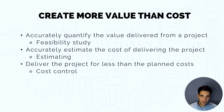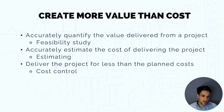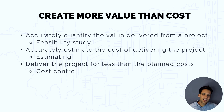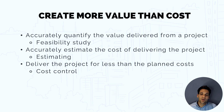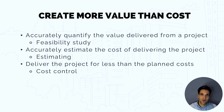To ensure we fulfill the objectives of project cost management, we need to do three things: accurately quantify the value delivered from the project through a feasibility study; accurately estimate the costs of delivering the project scope; and then, during project execution, control costs and spend less than what we budgeted for. If we do those three things, we will fulfill the outcomes of project cost management and ensure our project delivers more value than it costs.